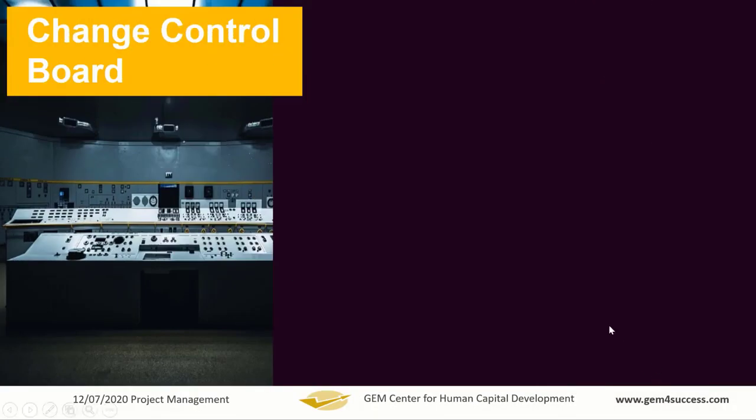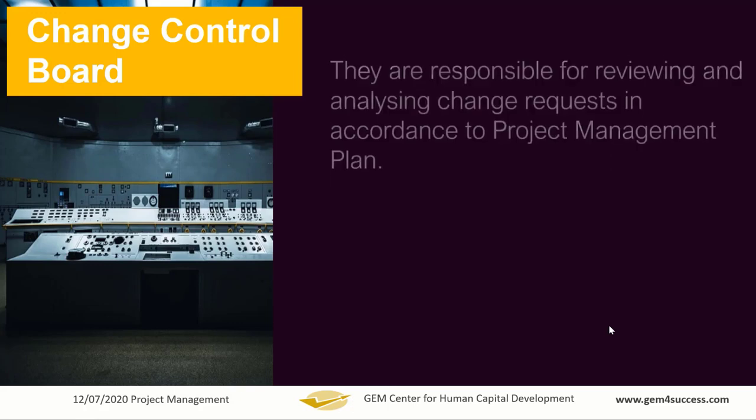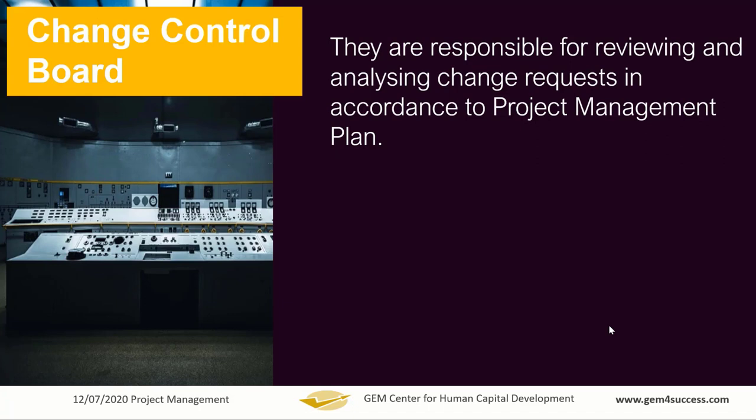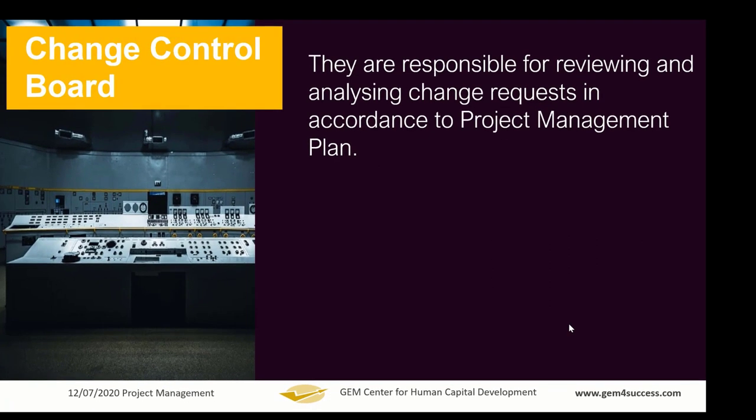So let's continue by discussing the change control board. What do we mean by the change control board? Essentially there is a set of people who handle the change request and manage changes on the project. So the change control board could either be the sponsor himself alone, or the sponsor could involve a number of other people. In fact, the sponsor can delegate it to a set of people that they should handle all matters of approving or rejecting changes on the project.